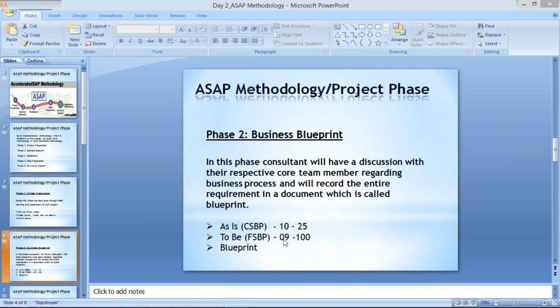But if we are going to go for any customization or development, it means we have to bring some extra resource for that, or that is an extra activity you can say. So for that there will be certain negotiation that you need to pay some extra amount. That is a different kind of negotiation. If the client agrees, then we are going to deliver, and a timeline and everything will be set for that. And if they do not agree, then we are not going to deliver that.